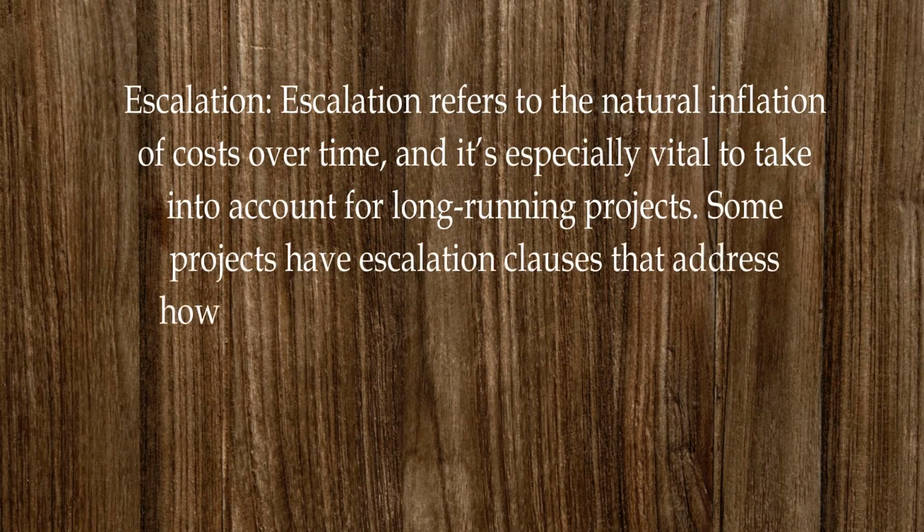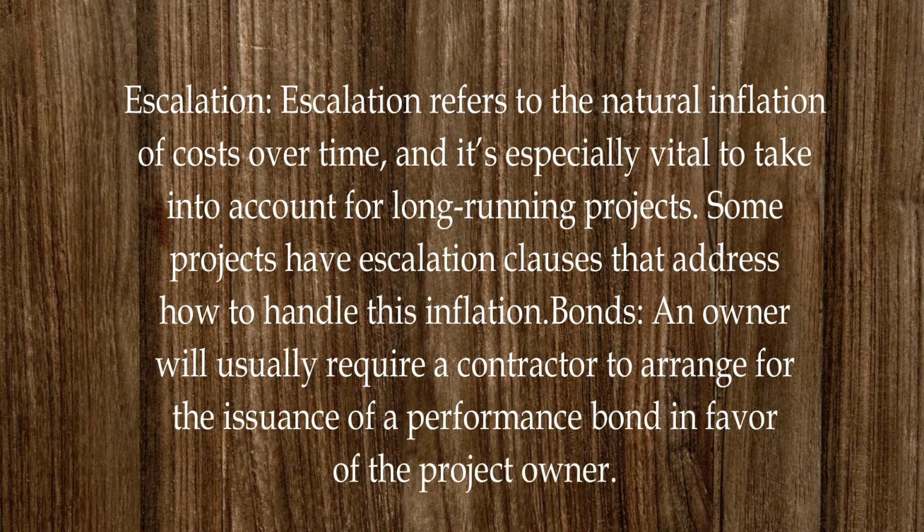Escalation. Escalation refers to the natural inflation of costs over time, and it's especially vital to take into account for long-running projects. Some projects have escalation clauses that address how to handle this inflation.